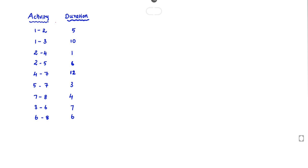So the activity and the corresponding duration are given. Activity 1 to 2: duration 5. Then 1 to 3: duration 10. Then 2 to 4: duration 1. Then 2 to 5: duration 6. Then 4 to 7: duration 12. Then 5 to 7: duration 3. Then 7 to 8: duration 4.